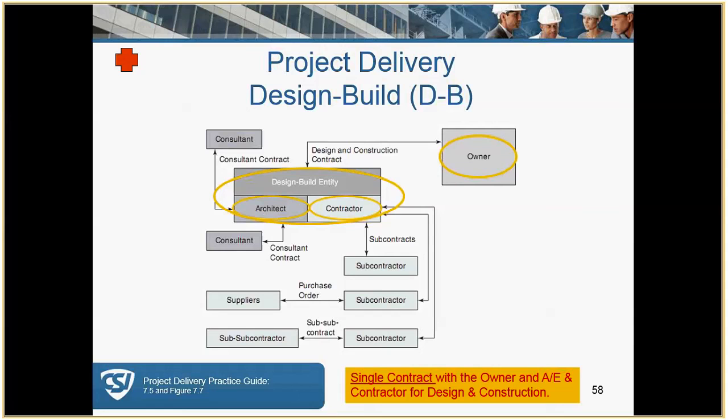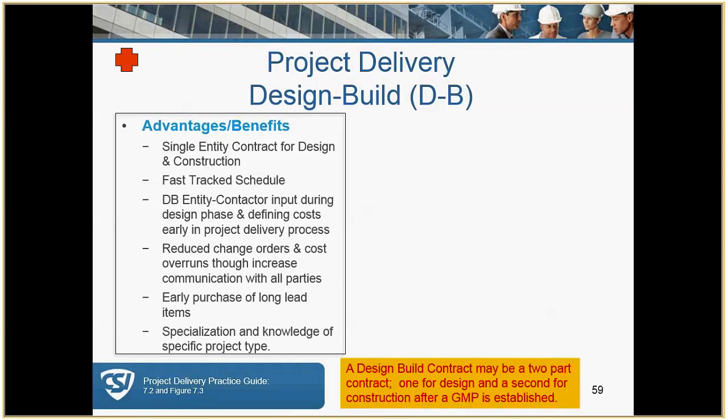Design build, it's a single contract. That's the most important thing to note about design build. We have one contract. So the owner signs one contract with an entity. And this alleviates any finger pointing, and it's one of the most distinguishing factors about design build.